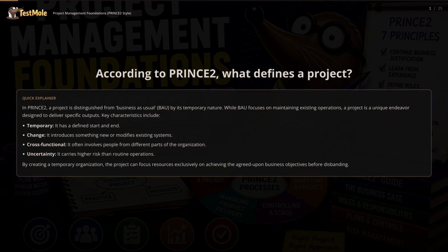The options are: A. The project manager. B. The executive on the project board. C. The senior user. D. The project support. The answer is B. The executive is the role specifically tasked with business accountability. The project manager manages the day-to-day work, while the senior user and senior supplier represent specific stakeholder groups rather than the overall project accountability.